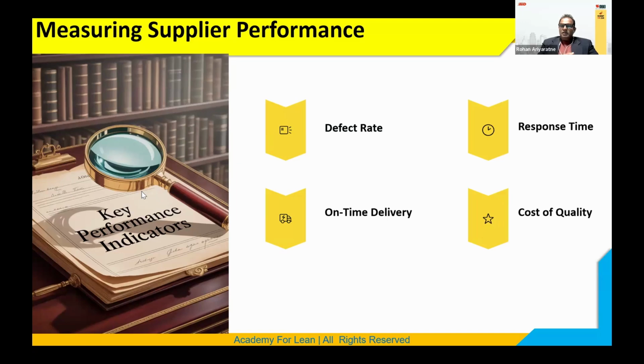I think you will agree with me. Then what happens is the manufacturing window shrinks, and at the end of the day the quality part will struggle, because everybody is rushing to send the delivery, sometimes taking shortcuts to send the goods on time. So the struggle is that the supplier is not giving the goods on time to our premises.